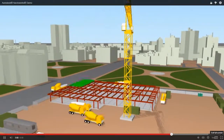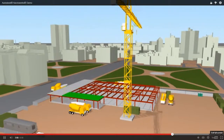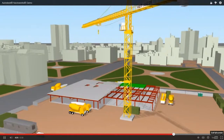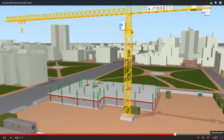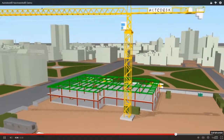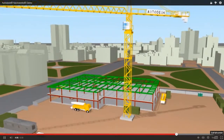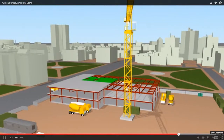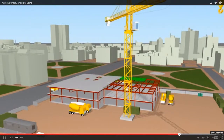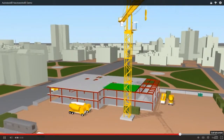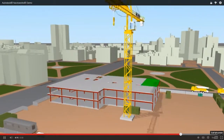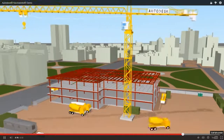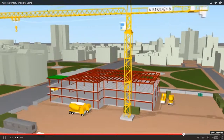Using the schedule to identify where materials will be delivered to site and where they can be staged, whilst maintaining relevant access routes. The simulations can also be used to communicate temporary road closures, diversions, and so on, in order to gain local government approvals or public acceptance.